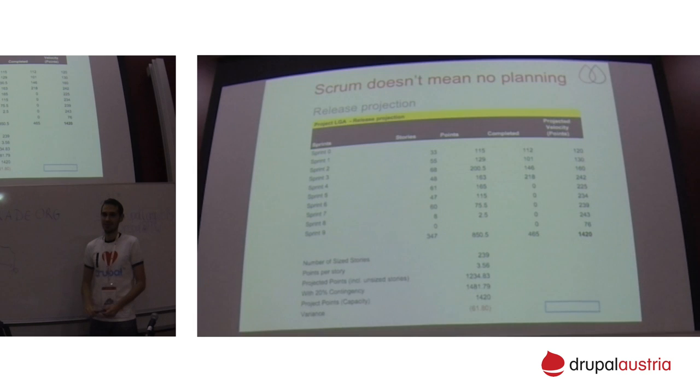What about using relative values, comparing different user stories and giving the story point based on that, not using absolute measures, like time? Yeah, absolutely. That's also another approach. It might be what is the most complex task for you, and how many story points it might be given. Then, let's say 10, 12. And what is the easiest task that you're going to handle? And this one is 0.5.